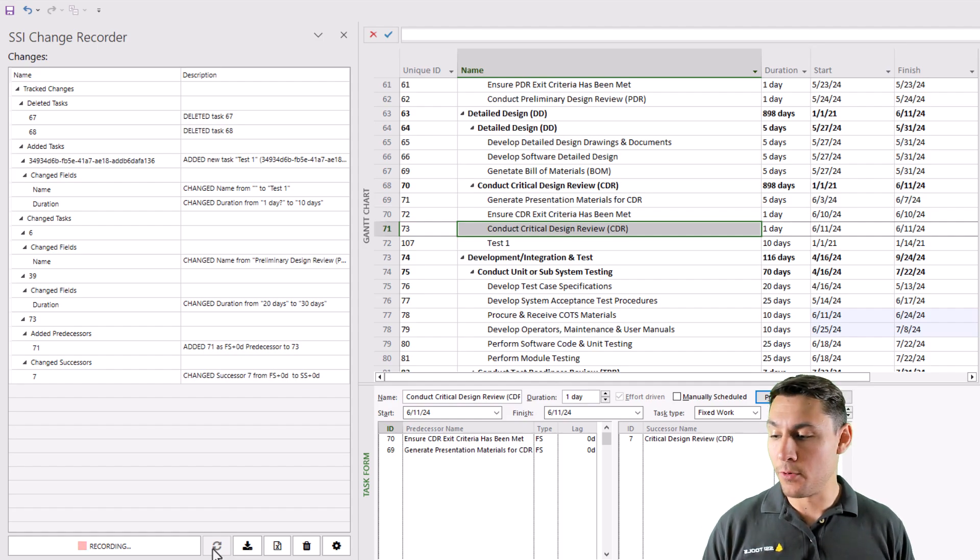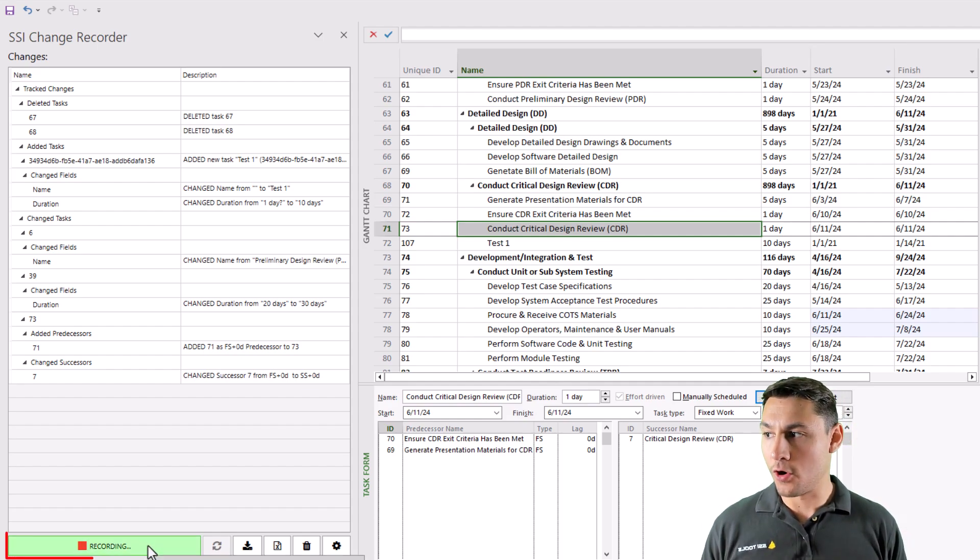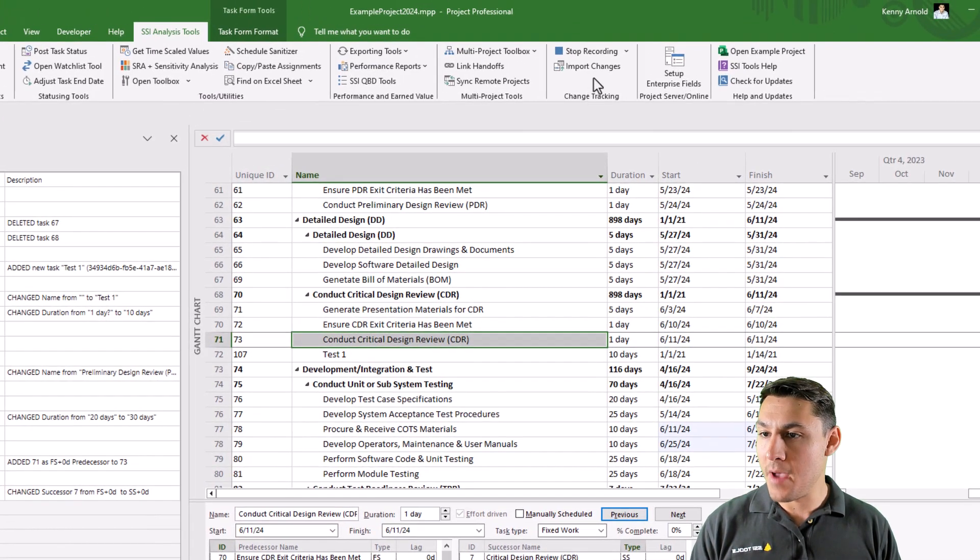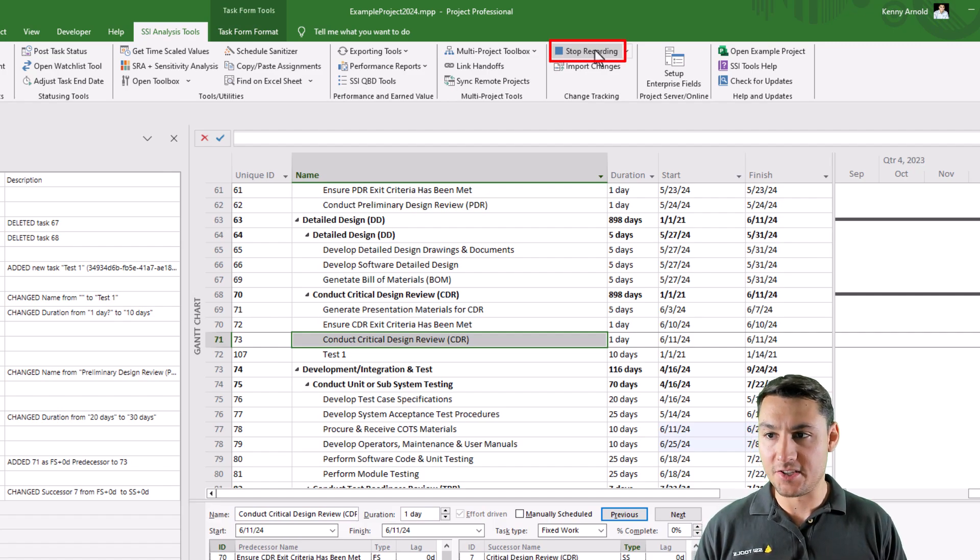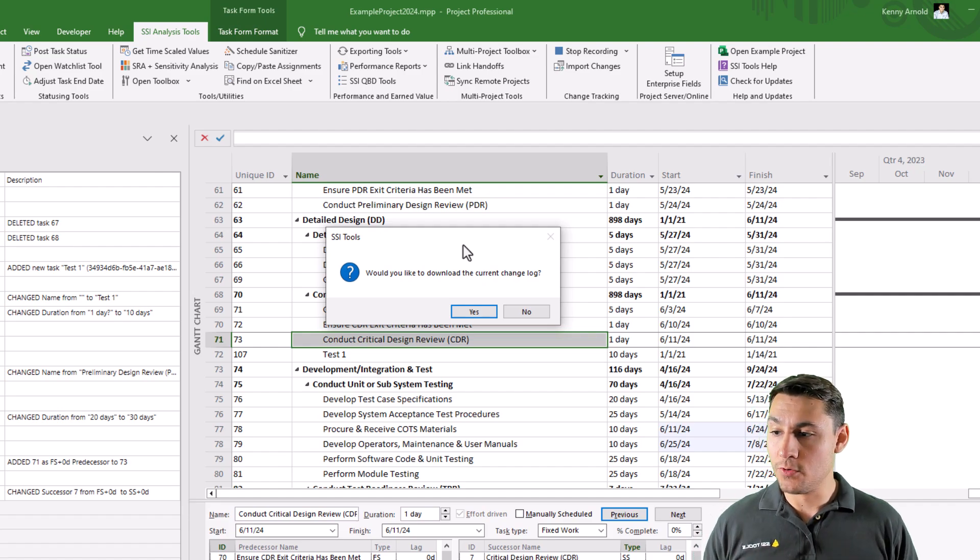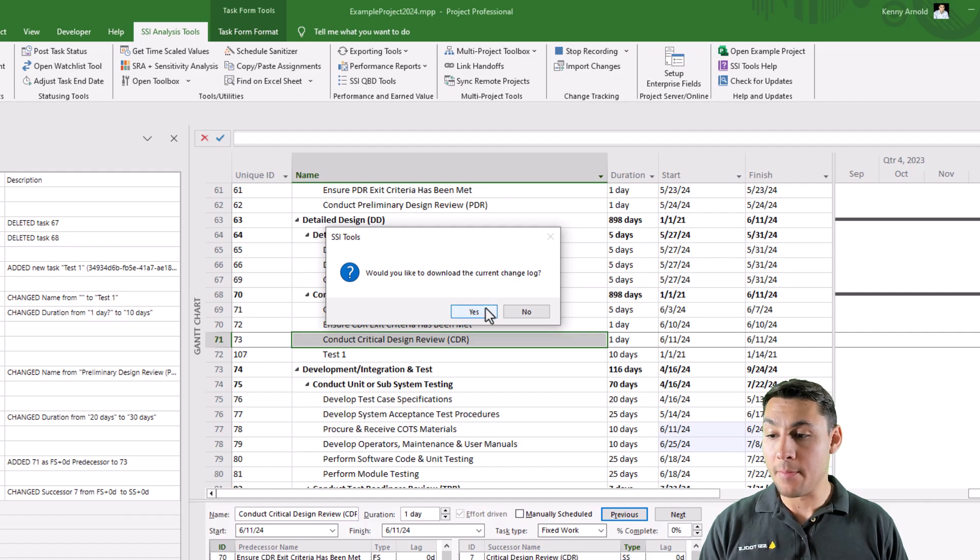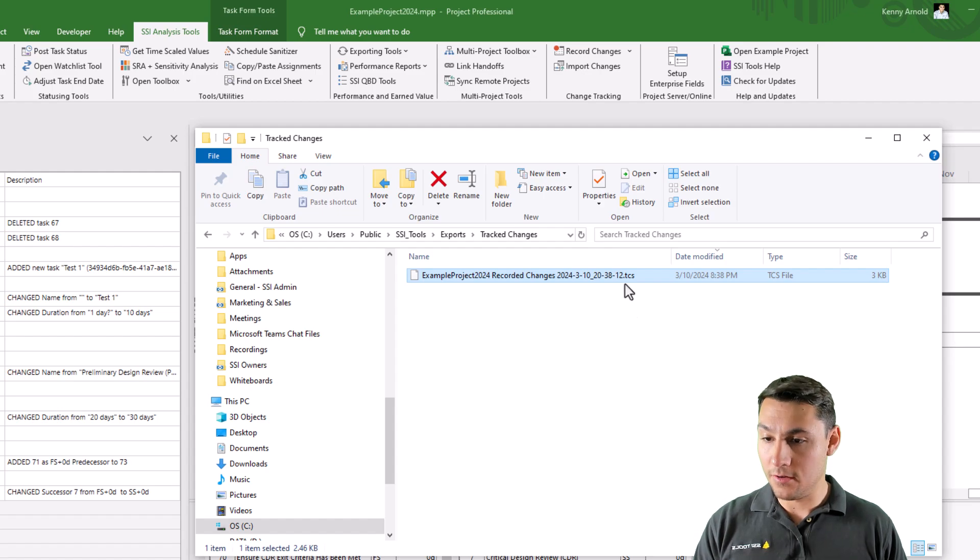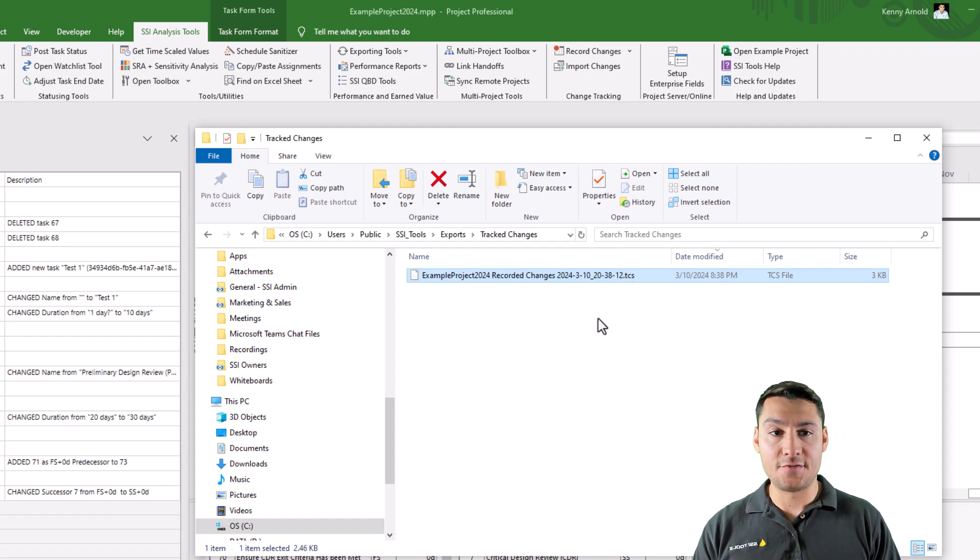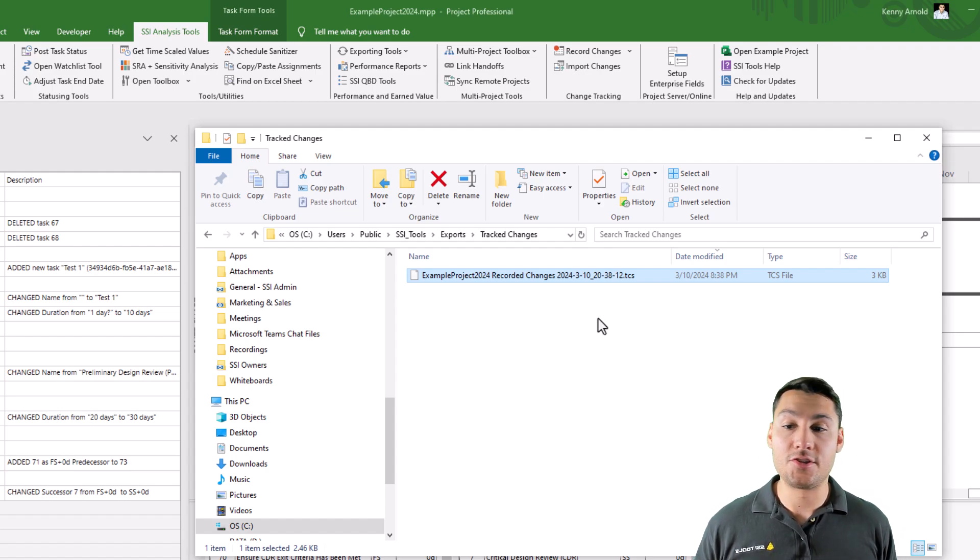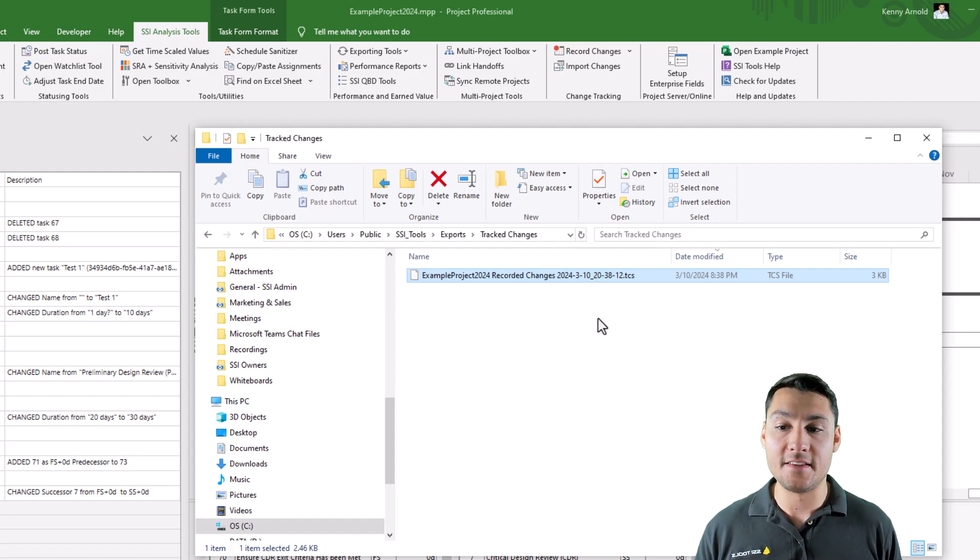When I'm ready to stop recording changes, I can either click this recording button in the change tracking details pane, or I can come back up to the original button that I clicked and click stop recording. As soon as I stop recording, SSI tools is going to ask me if I'd like to download the current change log. I'm going to say yes to this. And you can see now I have a new file, which is dot TCS, that stands for tracked changes, that can then be used by someone else to import and replicate these exact same changes that I made in this file.